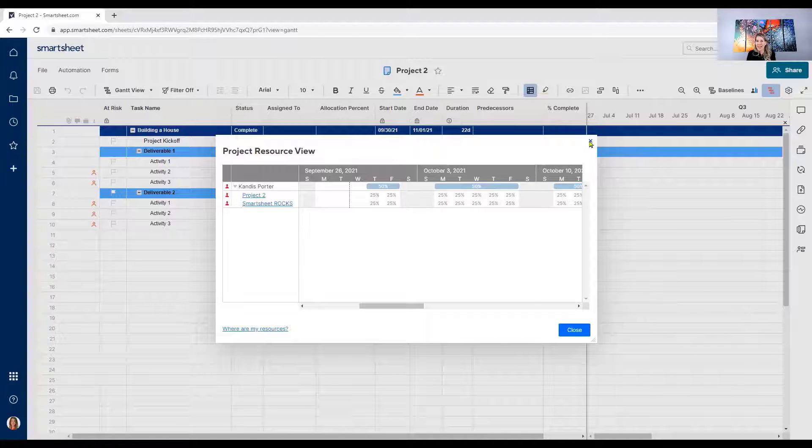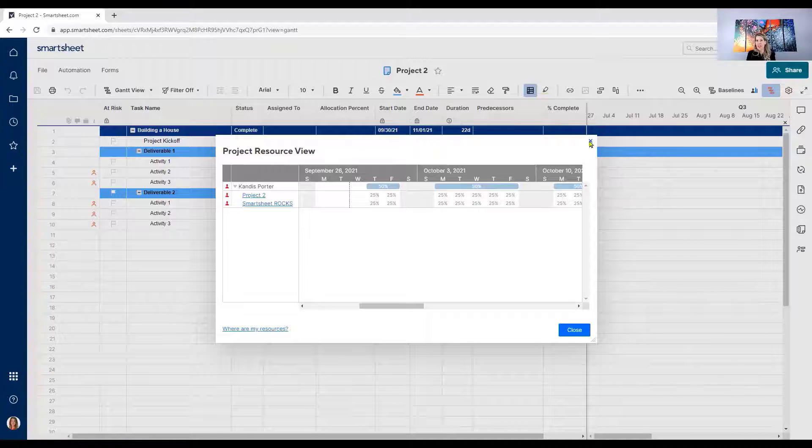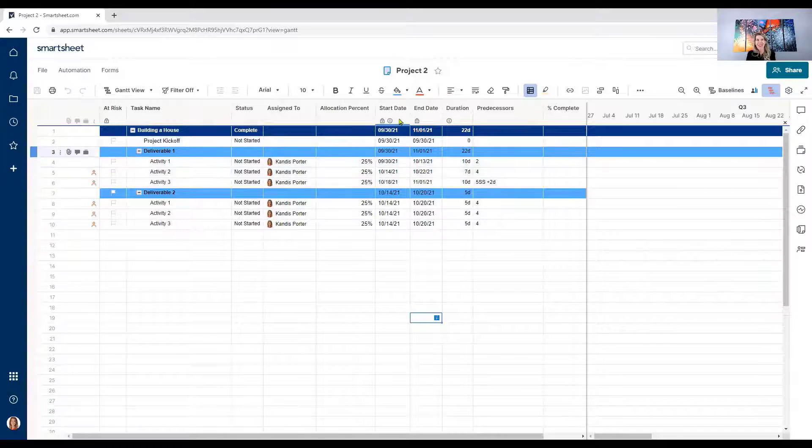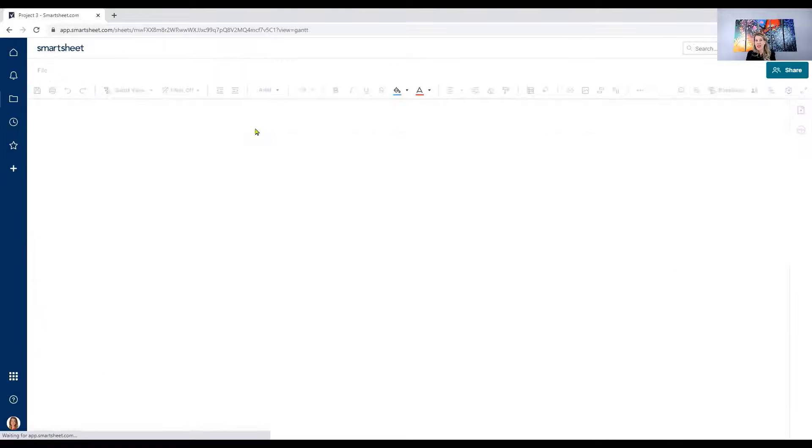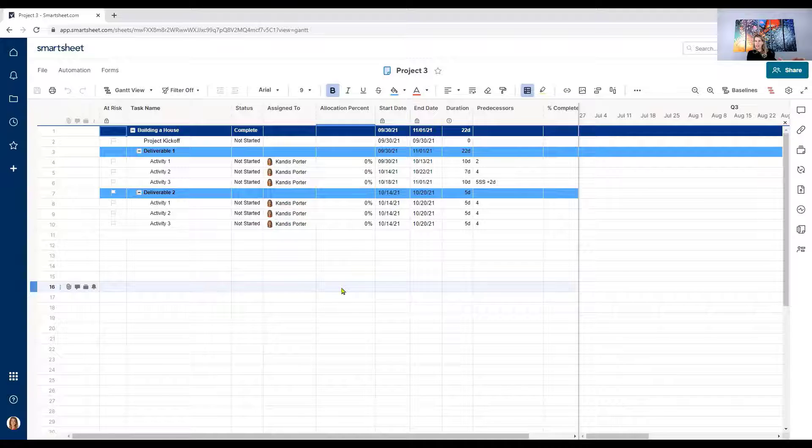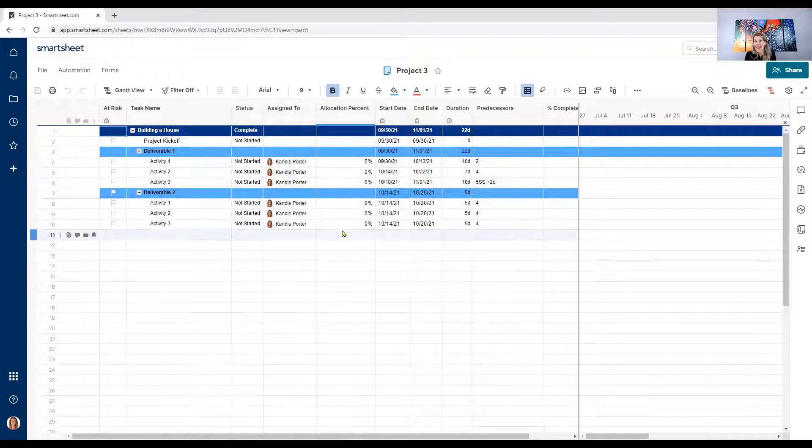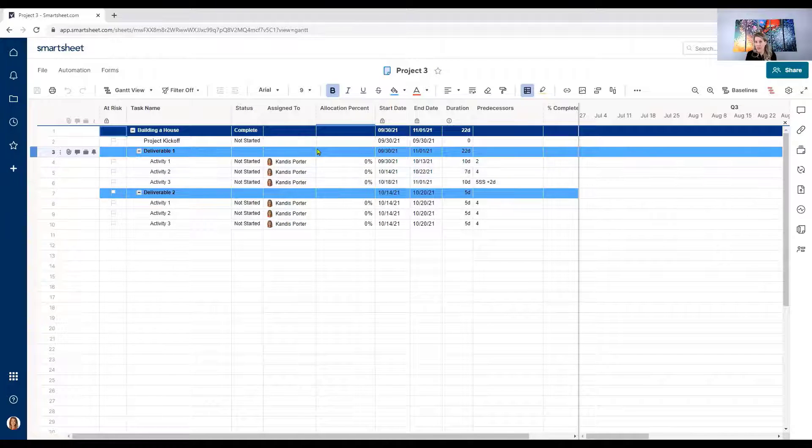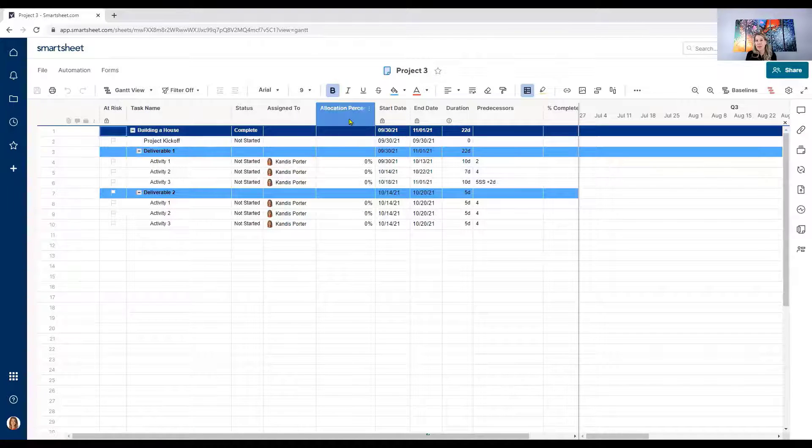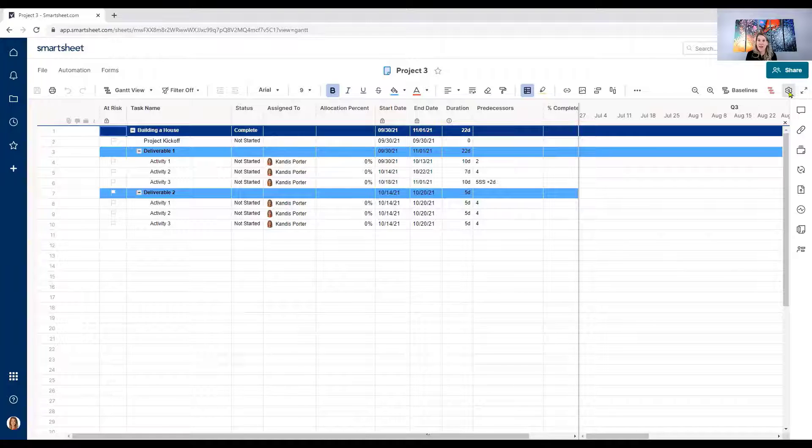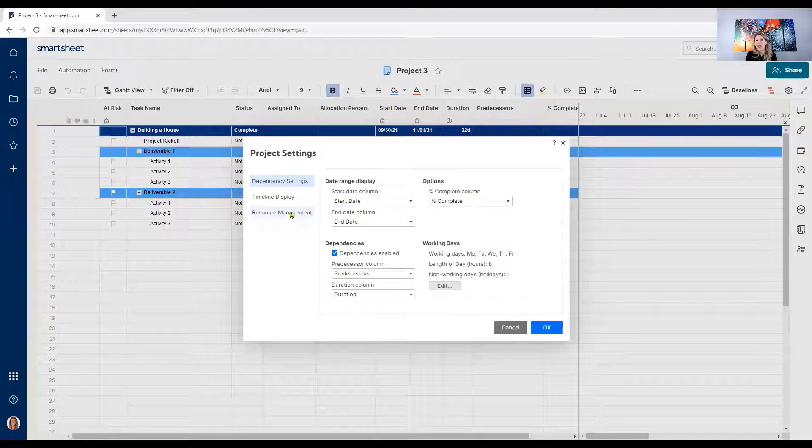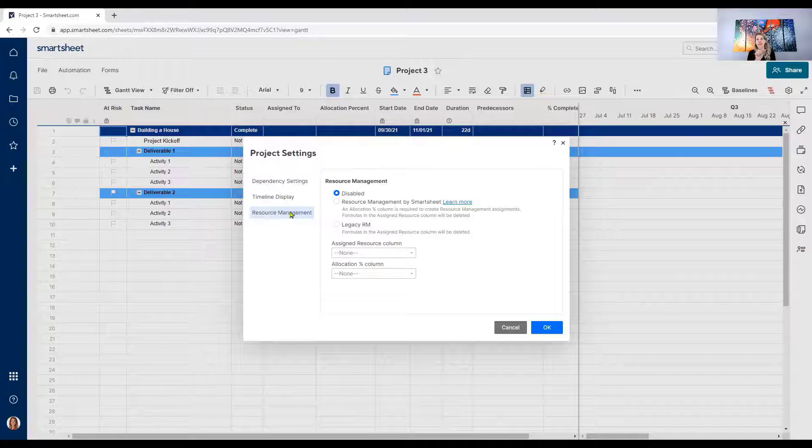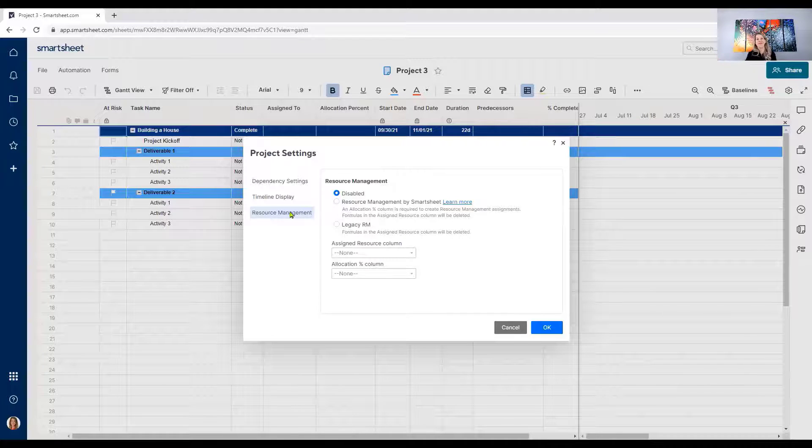So let's take this a step further. Project two, Smartsheet rocks. Let's get a project three in the mix now. I'm going to go ahead and go back to that folder I was within. So I'm going to click on project three now. There we go. Totally different project, project three. Let's say that we now want to allocate Candace to a third project. First of all, I've got to again make sure I've got my assigned to column. I've got to have my allocation percent column and I need to go in by clicking on that cog and I need to activate resource management in this project as well. So you need to allocate project resource management on each project.